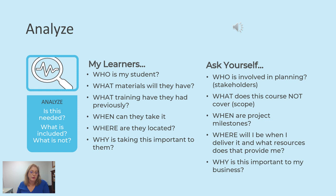Maybe you need other people to help you with the videos or with graphics, and you need to think a little bit about how you're working with them. The most important thing that you can figure out at the analyze stage is, what does the course not cover? That's called scope. Let's say you're teaching sewing. I'm going to teach people how to hand sew, but I'm not going to teach them how to sew on a machine.